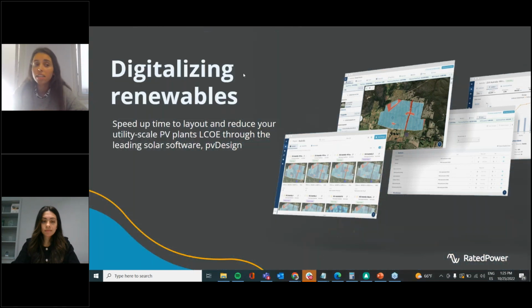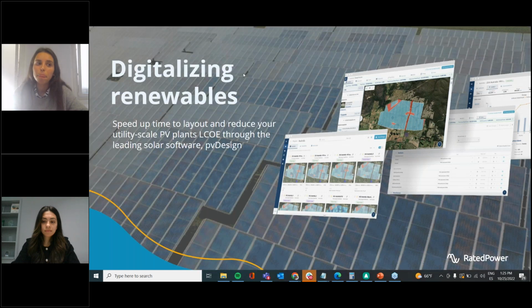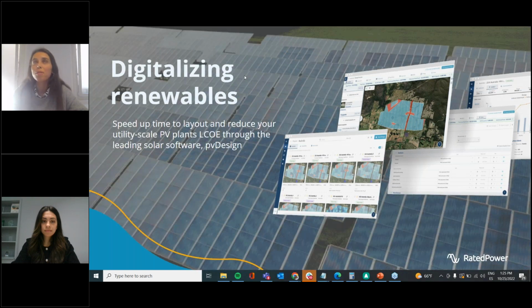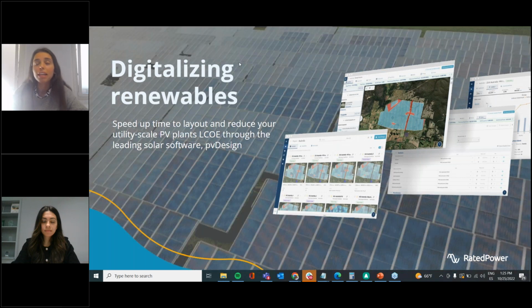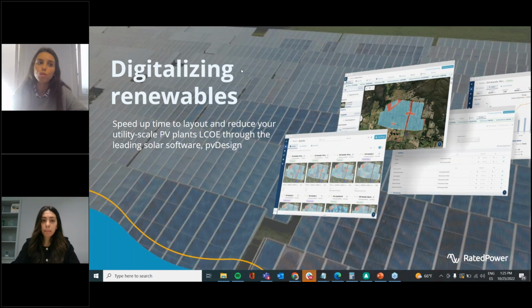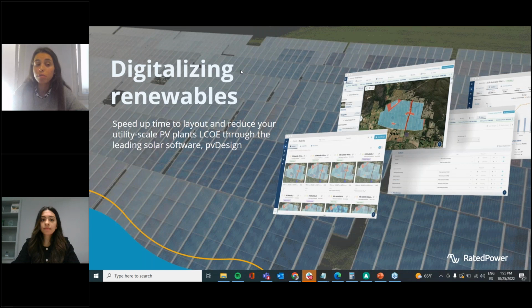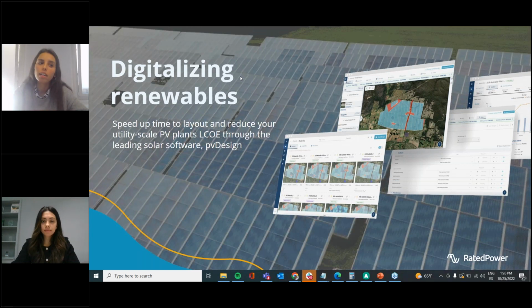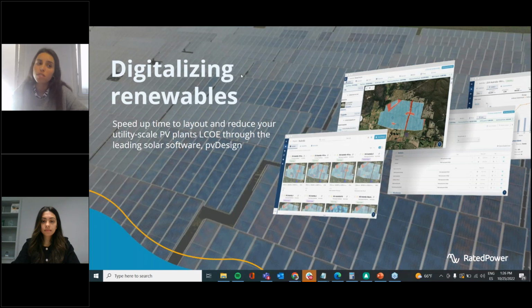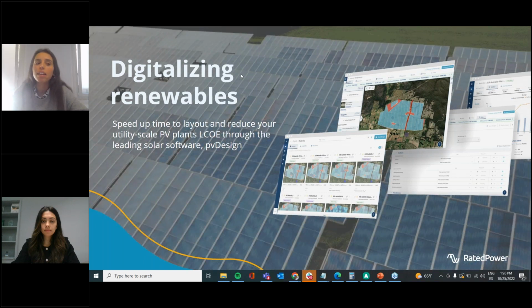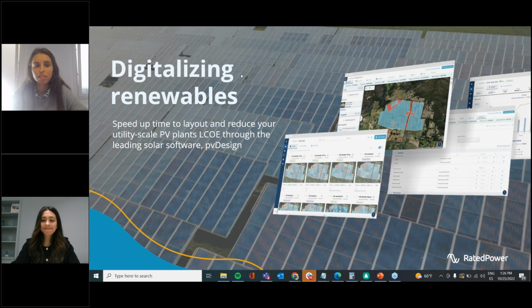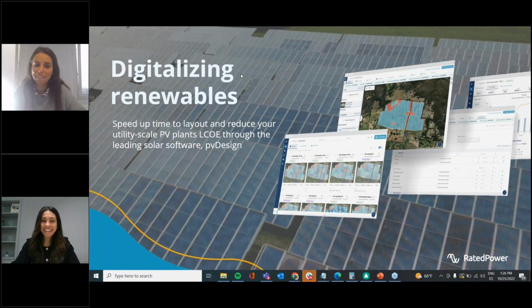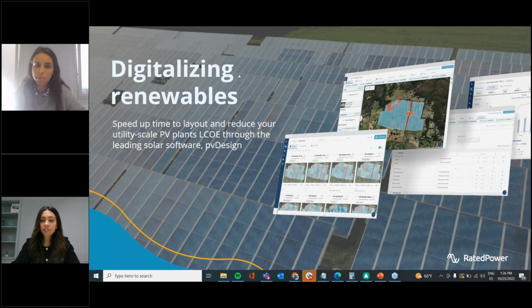But in terms of cable lengths, it's an accurate approximation of the real cable lengths of the plant. Maybe you could consider an extra 2% in order to account for that vertical part of the cable that we are not considering when giving the cable lengths in the bill of quantities. Okay. Thank you, Irene. So next one from Tujarko.